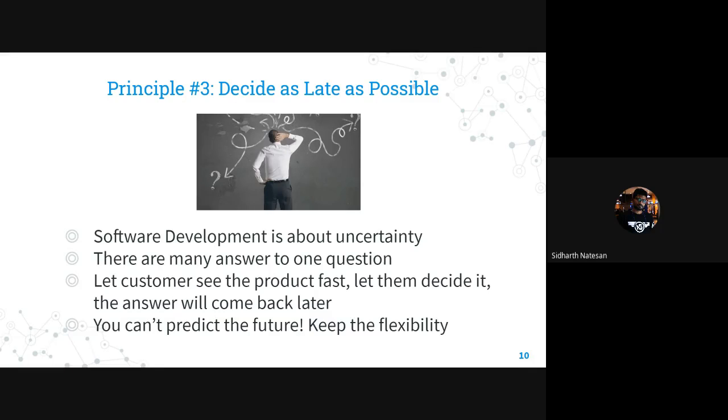once the project gets started, once we receive the scope from the customer, we will do some analysis. We will split up the products into high-level features. The high-level features will be split up into small backlog items, and then the backlog will start, where we will start working on the project. We will initialize the development stage of the project.